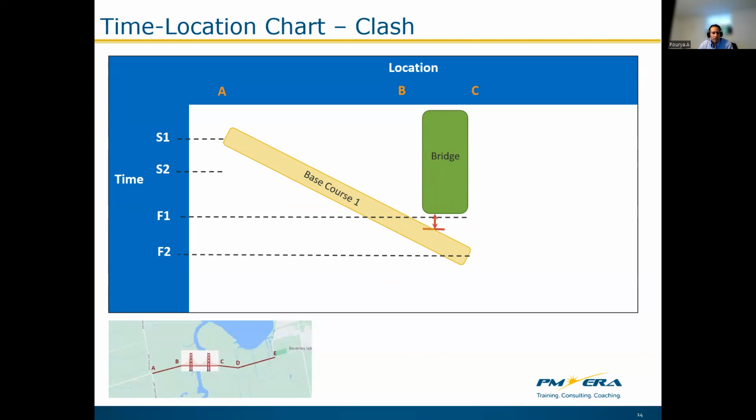But if we don't use the line of balance method and we only use the critical path method scheduling, control of this buffer is still difficult. The fourth option is to reduce the production rate, split the base course activities into two activities, and use the finish to start logic to tie this activity to these two and control this time lag.